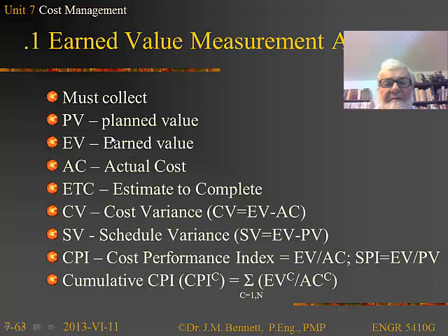Now, the earned value analysis looks something like this. The plan value is what we said we were going to do when we made the plan. We were basically saying we're going to plan to do such and such. So if we have an activity like gather requirements, we're going to say that's going to cost $20,000. That's the plan value, and we make those estimates as we talked about previously. The earned value is what we get when we get sign-off for a particular deliverable. So if the plan value for requirements was $10,000, and we got the earned value that it was accepted and it was done correctly, then we would quote-unquote earn $10,000.